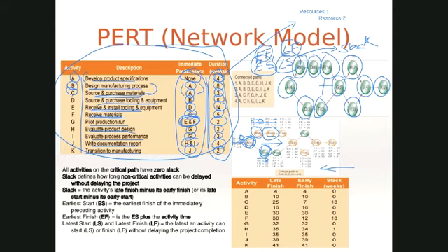Then you've got E out here, which takes 14 weeks, and it can only start when D has finished, and the earliest D finishes is week 16, and then it takes 14 weeks. Earliest it finishes is therefore 14 plus 16, which is 30. And you know that that's 30 weeks.